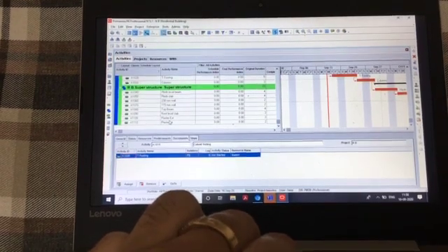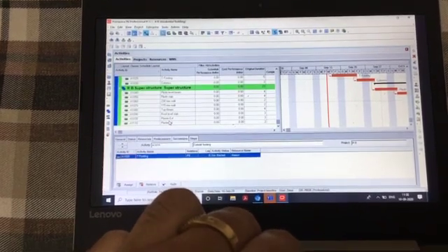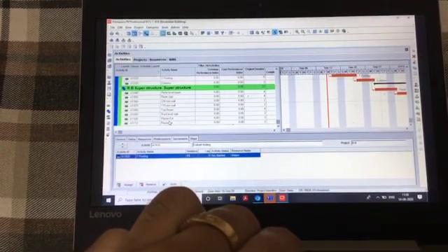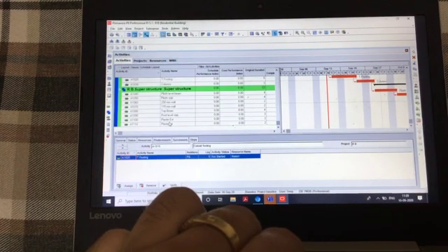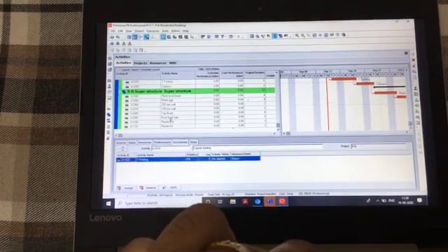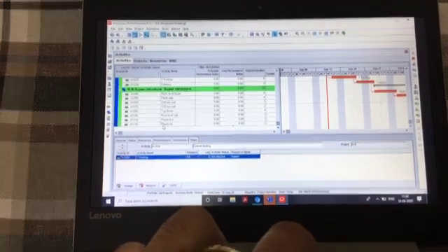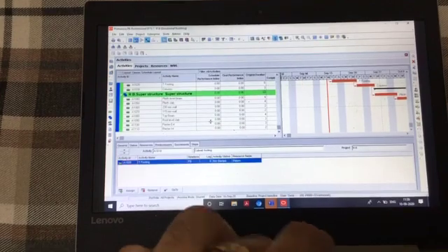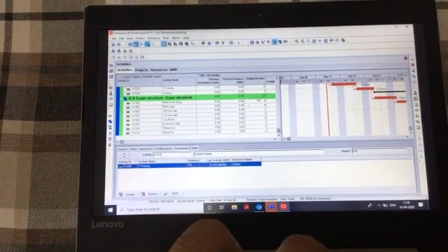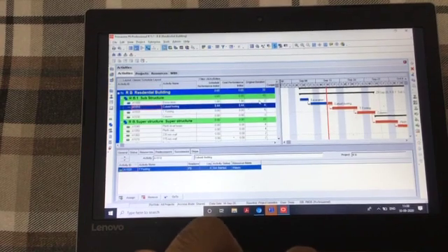Remember, 230 mm wall is measured in cubic meters, because it is a thick wall, and 115 mm wall is measured in square meters because it is a thin wall. Then top beam, roof level slab, up until the interior plaster. So these are the activities, and these are the original durations given to us, right? Number of days.